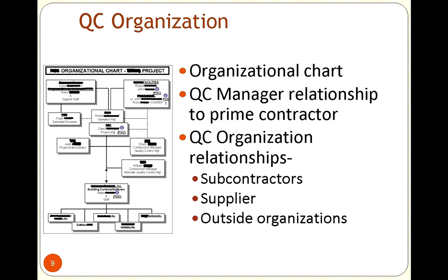So talking about the organization of the plan, let's talk about the organization of the people that are in the plan. Many times we would put together some kind of an organizational chart, and I would usually flag who was a primary point of contact. Now, I wanted to know who were the people that were primarily doing the job, but sometimes I needed to flag certain people that says, if you have a question, call this person first at this contractor or at the business office at the school, having some sense of what the relationships are in some type of a flow chart.